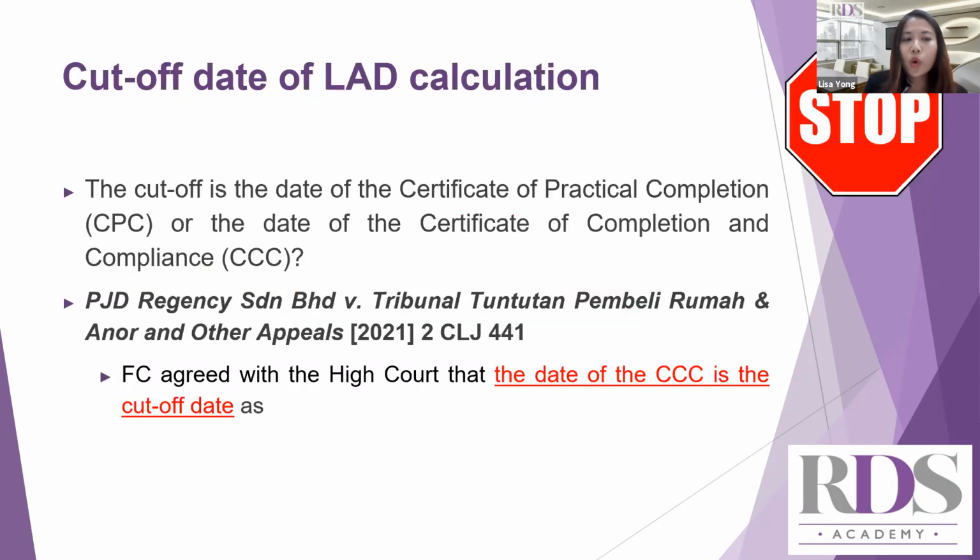So when do we know what is the cutoff date of LAD? The question is whether the cutoff date is the date of the CPC, Certificate of Practical Completion, or the date of the CCC, Certificate of Completion and Compliance.